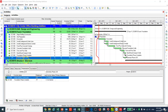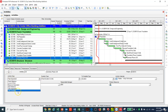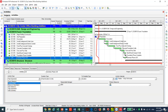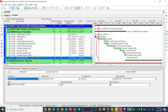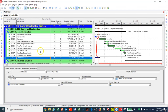One important step: go to the General tab and find the Activity Type field. As mentioned, there are many activity types available. Select Level of Effort. After setting the type, the activity disappears from the Gantt chart — run the schedule again with F9 and we'll address the display issue.